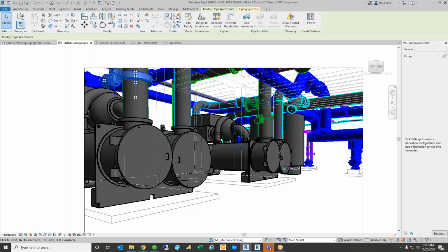And historically, on the design side, from the engineering standpoint, we've stopped at an LOD 300. We hand it off to the contractor. They take it to an LOD 350 so that they can do all their spooling and fabrication shops, hangar locations, and so on.